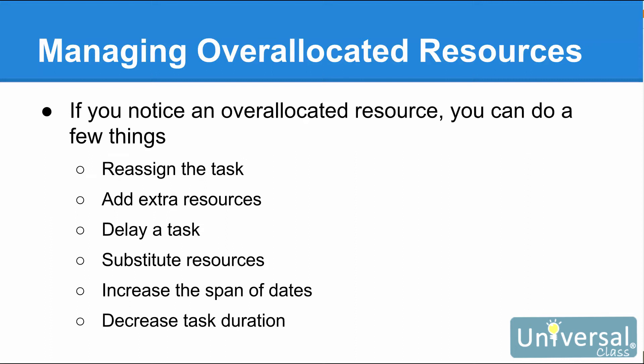If you ever discover that a resource has been over-allocated and you need to change this situation to keep on schedule, there are quite a few things you can do. As a project manager, you will want to take action immediately so that your resource does not remain bogged down and cause unnecessary delays or conflicts. Remedies include reassigning the task, adding an extra resource, delaying a task, substituting resources, increasing the span of dates that the resources are available to increase availability — which may mean granting overtime — or decreasing the task duration.